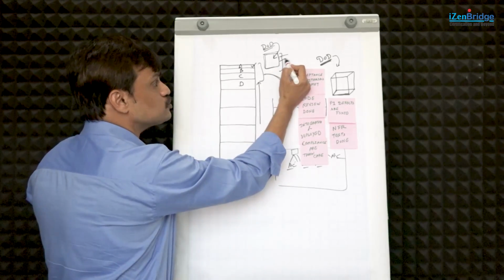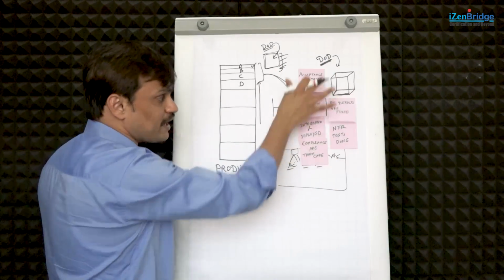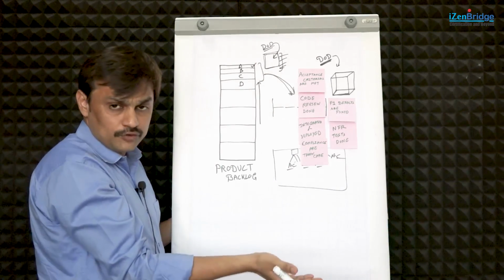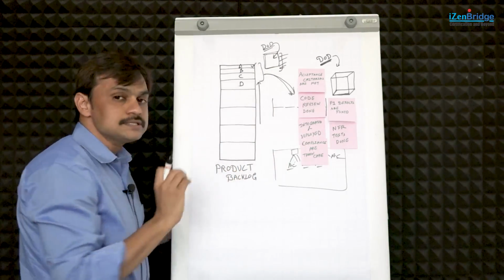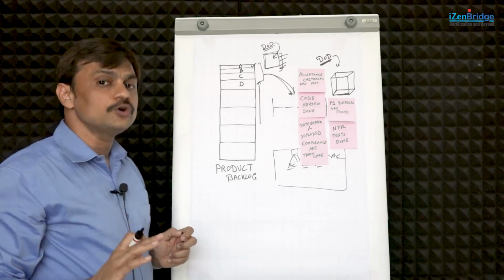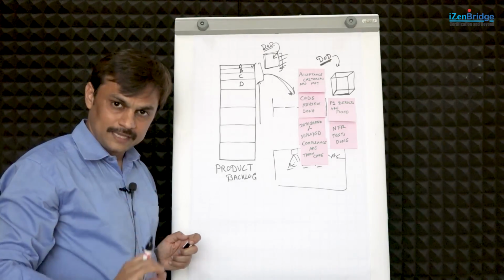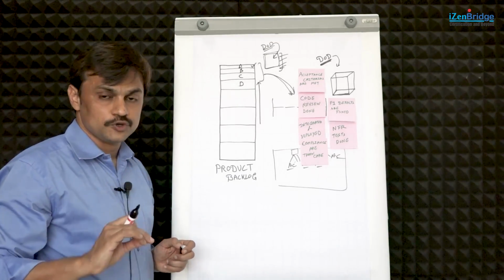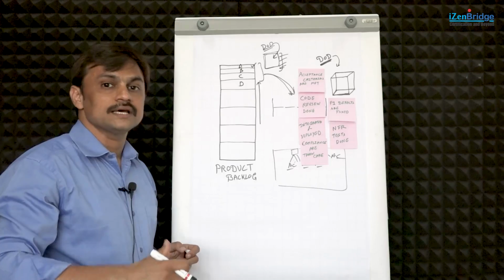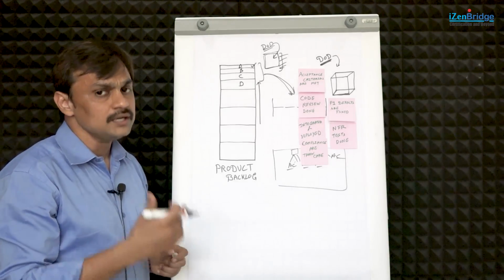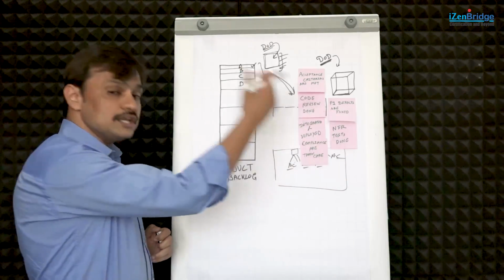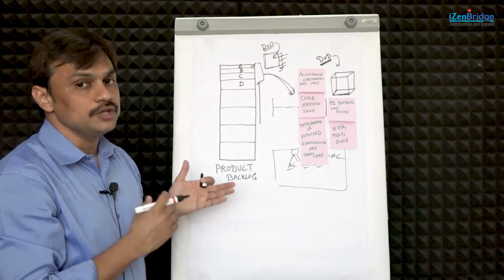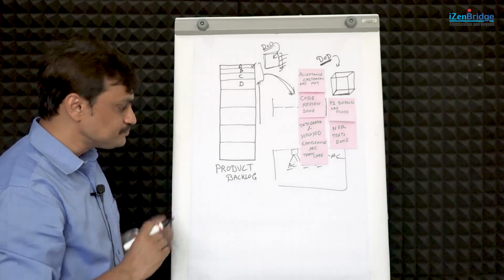How do you know what all needs to be done? If you know these 5 things need to be done, you will plan for those 5 things. But if you don't know about them, you won't plan for it. So you should have an understanding of the definition of done before doing the iteration planning or sprint planning meeting, because in a sprint planning or iteration planning meeting, you are referring to the definition of done when you are discovering the tasks and the work you are expected to do in a given iteration. If you change it in a retrospective meeting, maybe from the next iteration planning meeting, you start referring to the new definition of done.